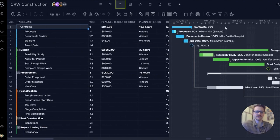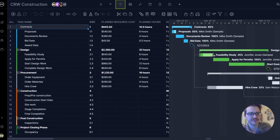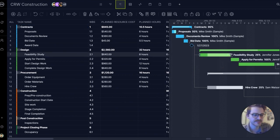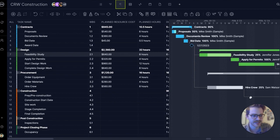But it's also quite flexible. Let's say the feasibility study is going to take longer than I thought. I, again, can simply drag and drop the timeline and the entire schedule will update.